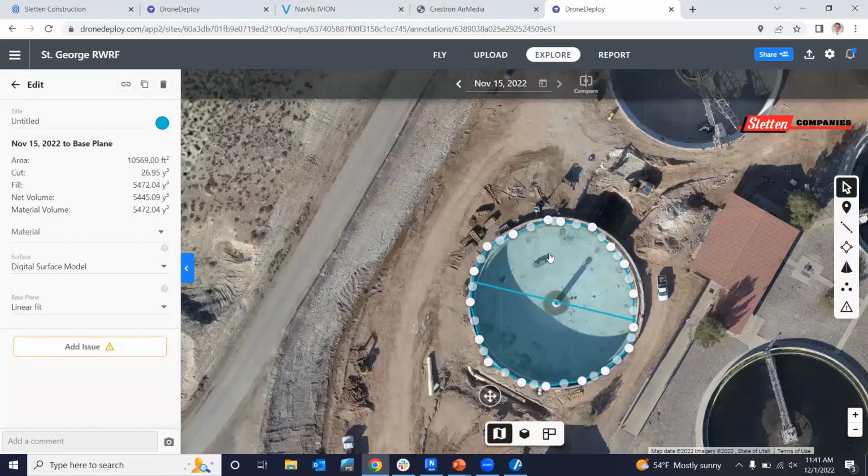Matt Schumacher isn't here, but on the Zone North Reservoir, he had to clear bedrock from his job, and he told the owner and gave him the bill for all the quantities that they cleared, and they wanted to fight him on it and say, no, you didn't remove that much. He pulled up his drone images from last year and showed them the cut and fill volume of that area that they cleared, and then they paid it. So right there, it paid for itself.